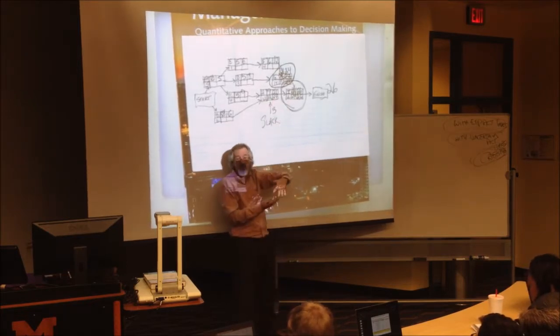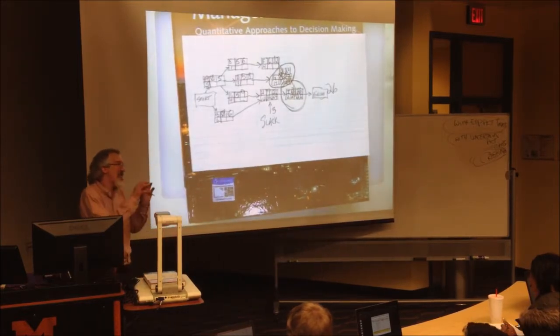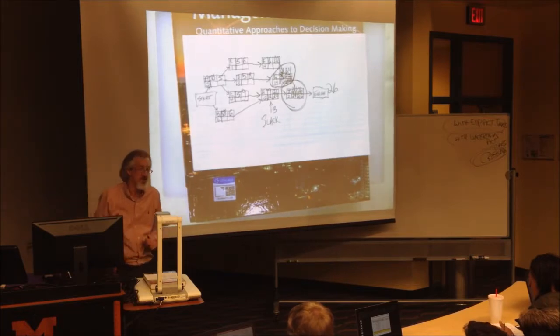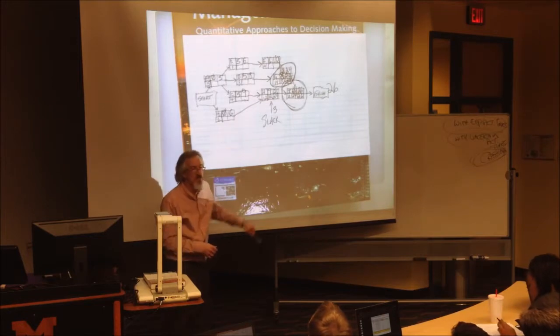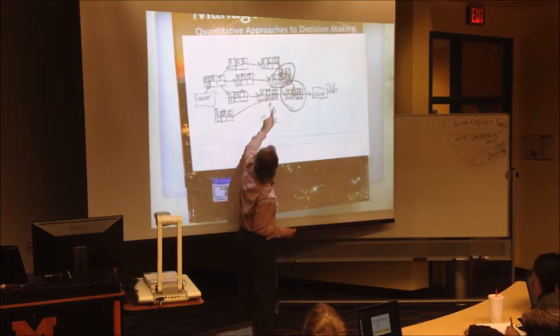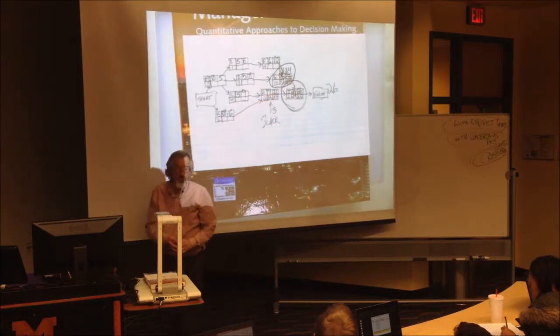So that's called slack. There's a buffer there that is not as critical of an activity. It's not going to hold up the project. You just subtracted 12. Yeah, the difference either the starts or the difference of the finishes here. Oh, I see. Yeah, 24 minus 12, 12, and then the difference here is just slack. Right. You either go the finishes or the starts, the same number, whichever one you want.